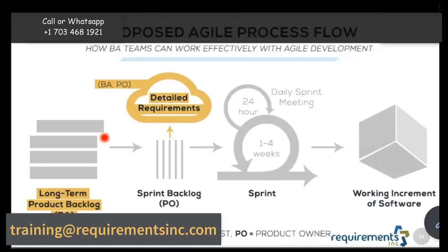Yes. So at the grooming meeting, you first go through each of the boxes, make sure none of the boxes are empty, so that at least you have some context in each box, that each box at least has a sheet or as many sheets as needed. Another thing you do is you also make sure the top 10 boxes are full of information ready to be picked up by the Scrum team. So each box can have multiple user stories, and each user story can have multiple acceptance criteria.